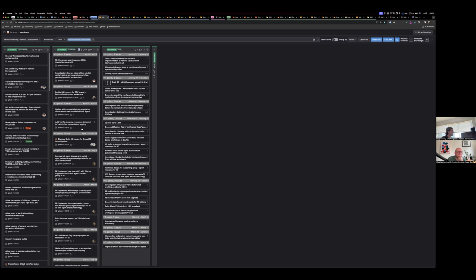Issues that need more design will often come up in an IPM. Like, the questions that arise will be like, oh, this actually needs to get more design done on it. Let's deprioritize that and send it back for more refinement.